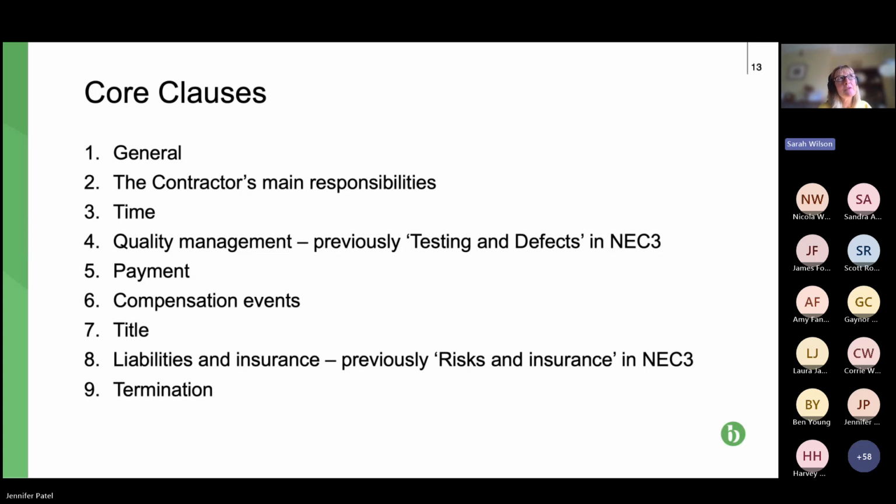That is the contractors' and subcontractors' route to claiming. As I've said, I think it's February, we've got a whole seminar on that, because there are grounds for compensation events, and also there's a process to claim. Both are super important. 7 is title, a pretty short section, basically looking at who has title to goods until they're paid for, until they're installed into the facility.